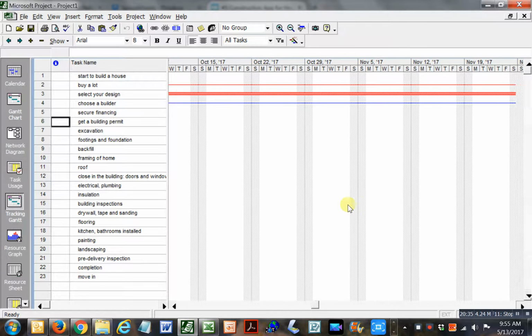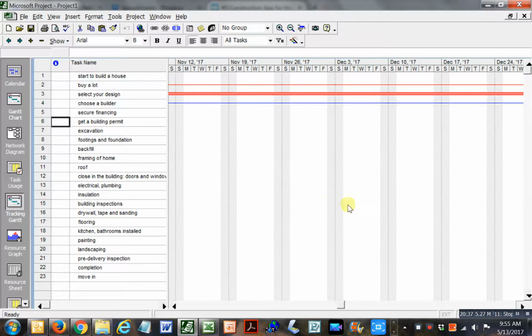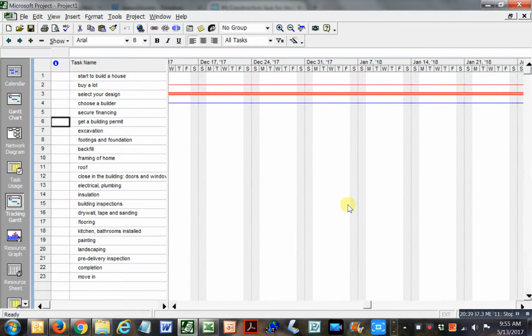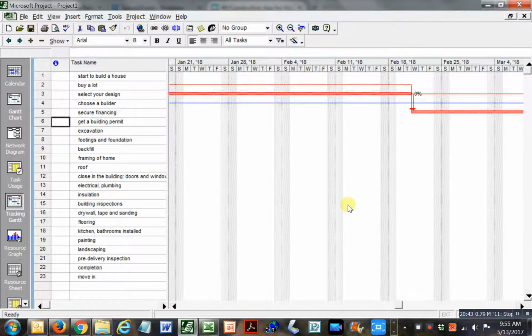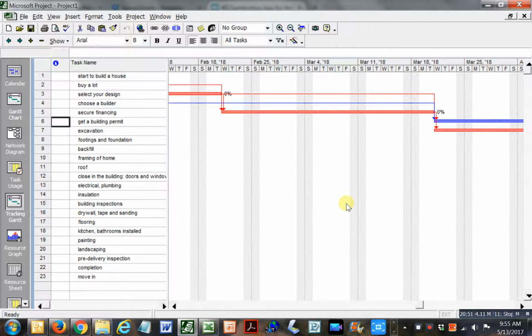Remember, we have to go 6 months to get that design perfected. And remember, it's way, way, way cheaper to make a change on a plan than once you have started building. Please, the change orders that you sign should be minimal, minimal, minimal, because change orders are what kill projects. They drive your costs way up, right? And the time and delay is atrocious. All right, so let's see what else is critical and non-critical.